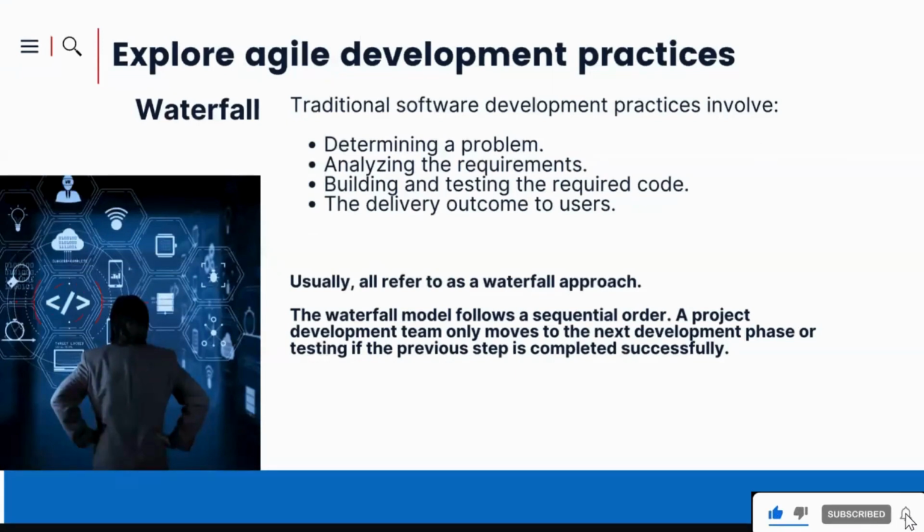The waterfall model. Have you heard about waterfall? If not, traditional software development practice involves determining a problem, analyzing the requirements, building and testing the code, and delivering the outcome to the user. This is usually referred to as the waterfall approach. The waterfall model follows a sequential order. A project development team only moves to the next development phase or testing if the previous step is completed successfully.